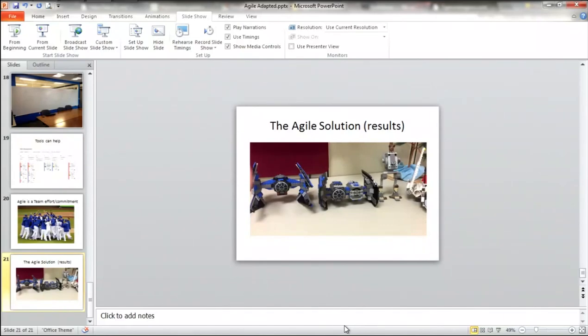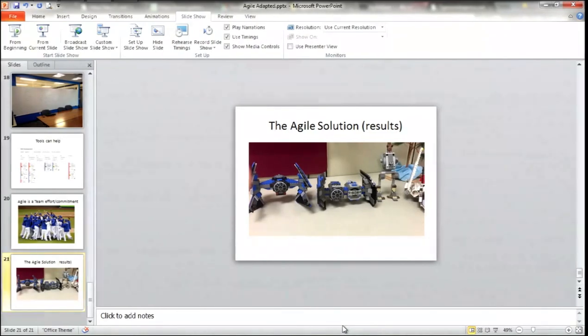You keep saying stories. What exactly is a story? A story, yes. In terms of what we have here, each one of these was a story. A story is going to be a set of requirements and acceptance criteria and the actions that were taken to get from requirements to acceptance criteria, fulfilling the criteria.